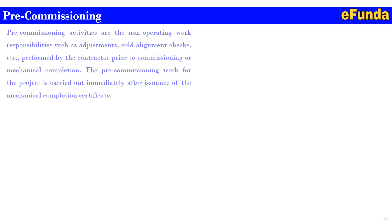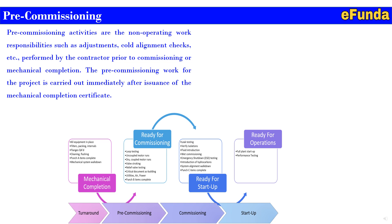Pre-commissioning activities are non-operating work responsibilities such as adjustment, hold, alignment checks, etc., performed by the contractor prior to commissioning or mechanical completion. The pre-commissioning work is carried out immediately after the issuance of the mechanical completion certificate. One can refer to the figure showing turnaround: pre-commissioning, commissioning, and startup. Under mechanical completion, all equipment is in place — filter packaging, internal flanges, cleaning, flushing, punch items complete, and mechanical system walkdown. Moving to ready for commissioning: loop testing, uncoupled motor run, dry-coupled motor run, valve stroking, relief valve testing, and critical documents like utilities, air, and power.